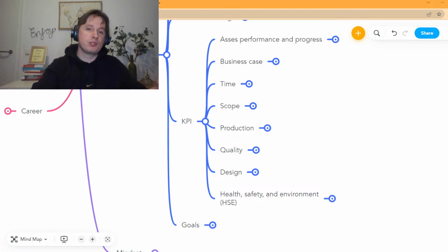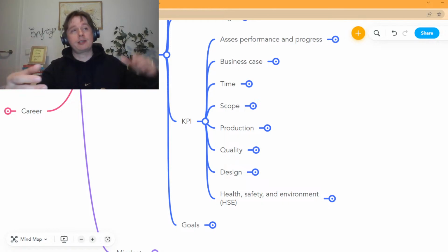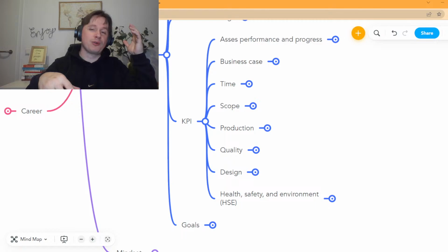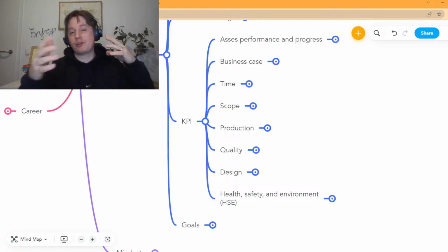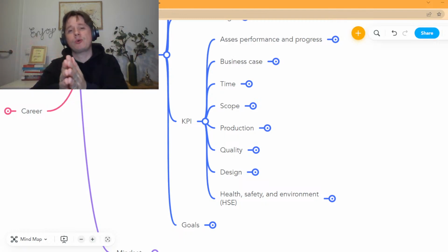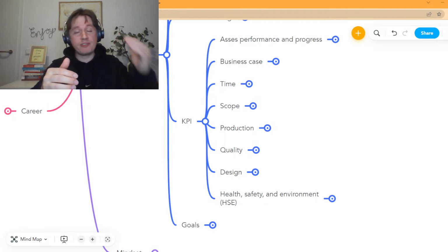In this case, we are going to see a time KPI. You can look for different time KPIs, like a burn down or burn up or whatever you want to do, S curve, SPI, or you're going to follow your progress on MS Project or whatever way you need to report it, milestone adherence and so on. It's very important that you have a time KPI.